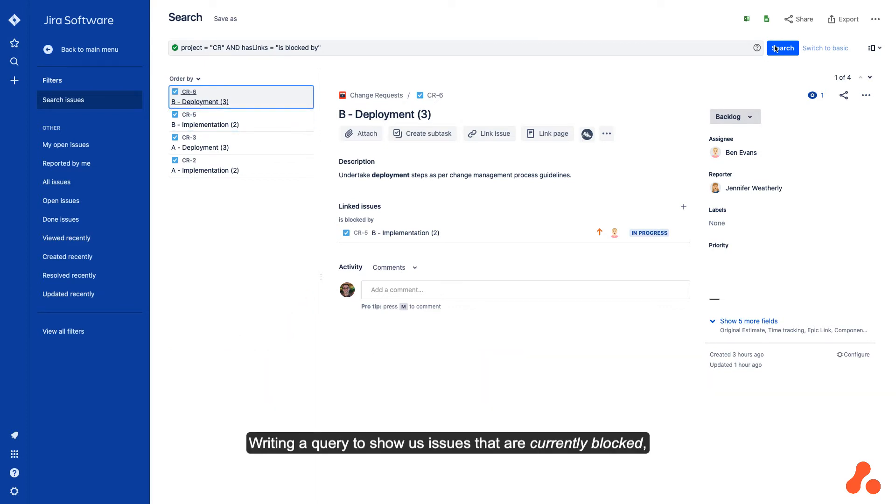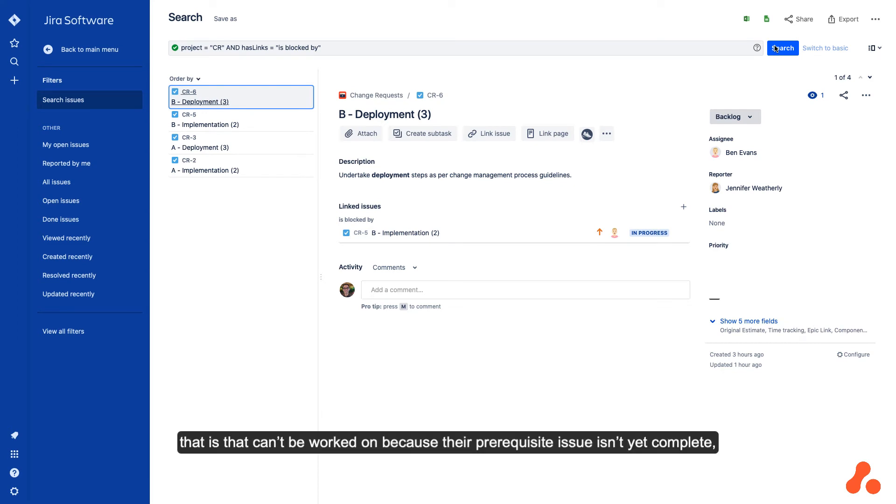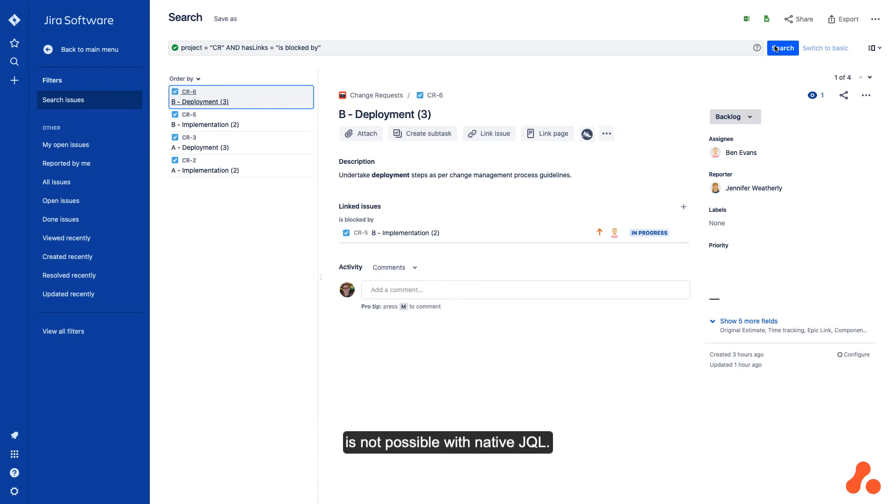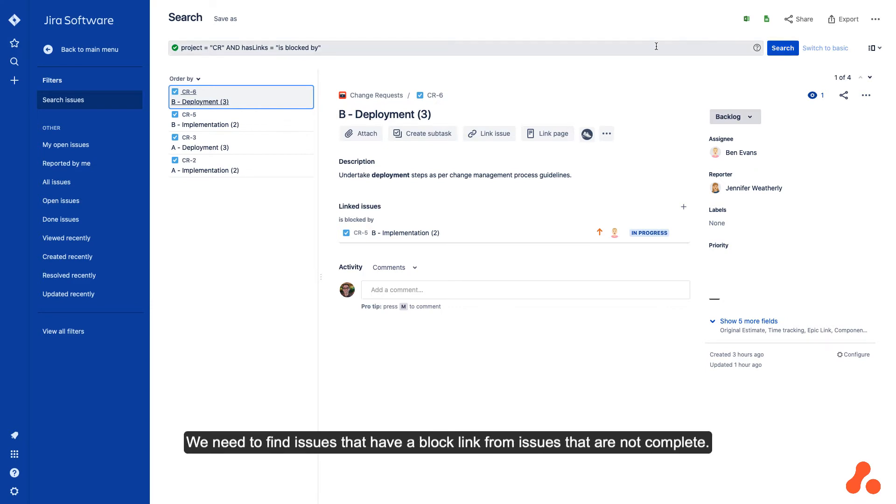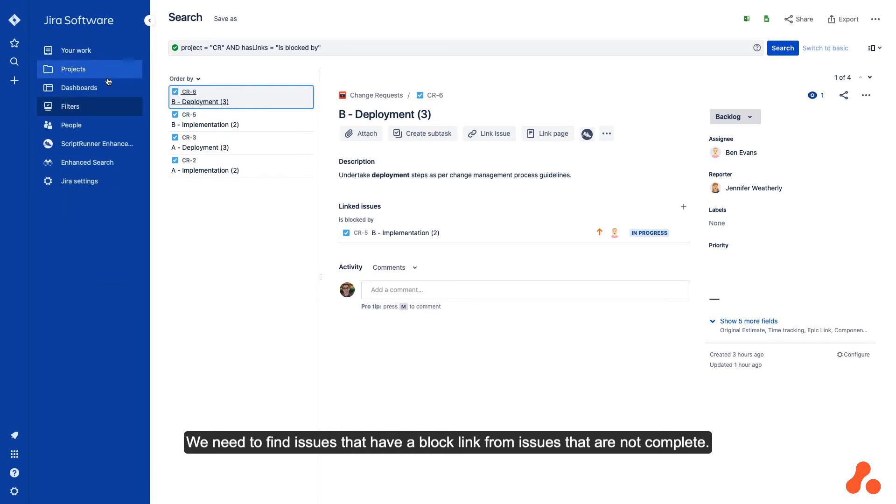Writing a query to show us issues that are currently blocked—that is, that cannot be worked on because their prerequisite issue isn't yet complete—is not possible with native JQL. This is because there is no way to express a subquery. We need to find issues that have a block link from issues that are not complete.